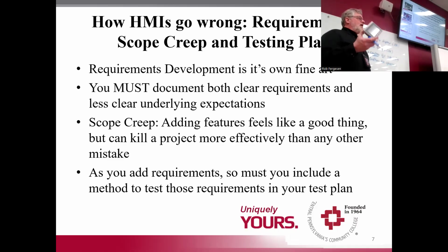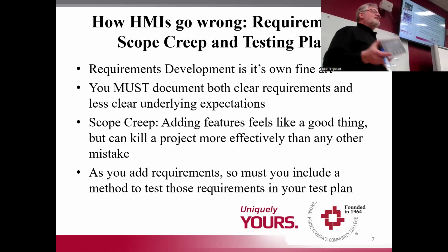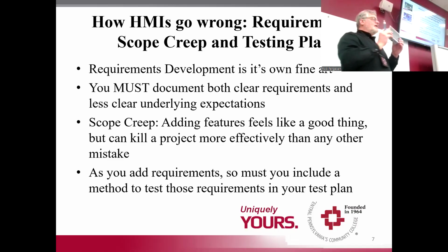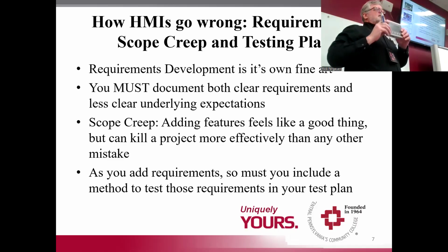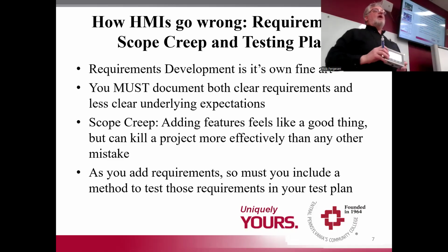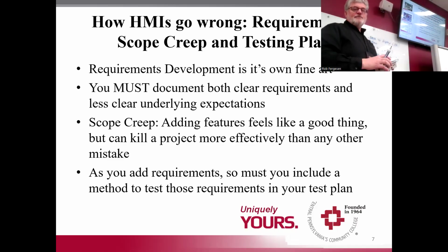You have to document each one of them, and you need to document the state of your I/O in each one of those conditions. The reason for documenting all these conditions is, as you design these screens, you want to make sure you're clear that under each one of these conditions, you could have a test. And we're going to talk about testing in a minute. But you have to be able to test these I/O in real world conditions, in real world scenarios. So this all goes back to your testing. You write a requirement and then you put out a test that tests that requirement. You should always have at least one test for every requirement.